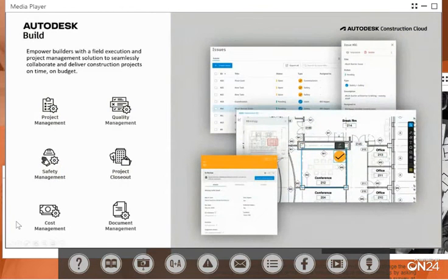So moving on then, we've got the project, we've been awarded, we've done all the estimates, we're on site effectively, right? That's where Autodesk Build really takes hold. So Autodesk Build is a full project management solution. It starts with things like issues and RFIs. So an issue can be something that might be an RFI, might not be, might just be design information. It's pretty much anything and everything on a project. It's nothing that is formalized, but it's information that needs to be recorded as a potential problem.